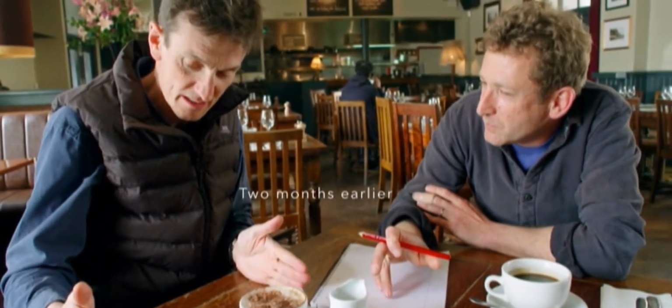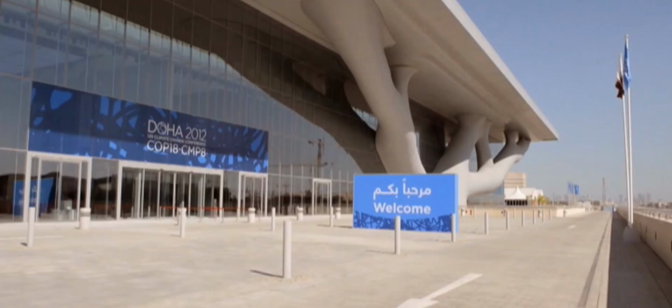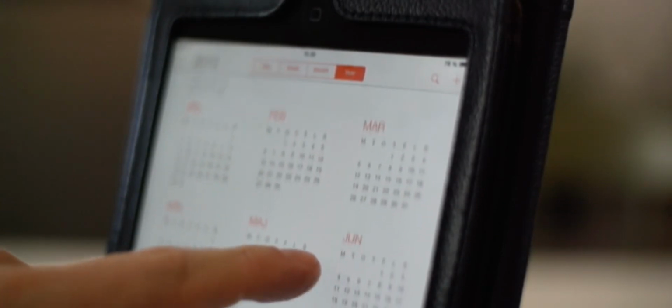We really want to get things up and running. We want to have a good commissioning period of, say, 2-3 months before COP 18. So we really want to be finished by the end of September. But that's 7 months, isn't it? 7 or 8 months. Yep.